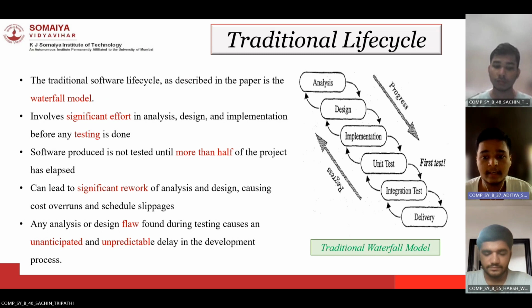This can lead to significant rework of analysis and design, causing cost overruns and schedule delays. Any analysis or design flaw found during the testing causes an unanticipated and unpredictable delay in the development process. So these were the bugs found by the author in the traditional life cycle, that is the waterfall model.